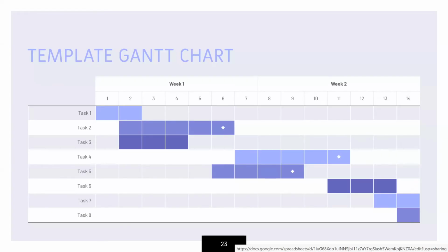One of the most common ways of tracking or monitoring a project is using a Gantt chart. This is just an abstract example that looks nice with this theme. There is a real live example that Janice has put together, linked in the template links at the end of the presentation. But many of us have used these before. It lays out tasks on the y-axis, up and down, and the timeline on the other axis, and plots, sometimes with color coding for various stages of completion, what the status of a particular deliverable is in the context of the whole project.